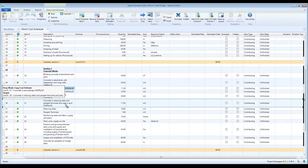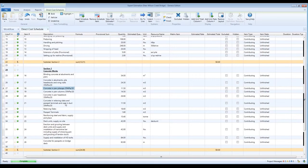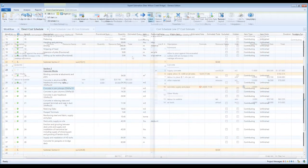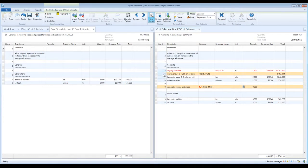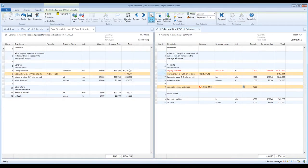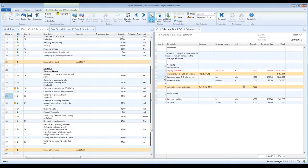This is a quick and easy way of copying and pasting cost estimates, and the conflict resolution window will appear if required. You can also drag and drop cost estimate lines. This allows you to copy and paste selected lines between cost estimates, or append a target cost estimate when dropping onto a schedule item.